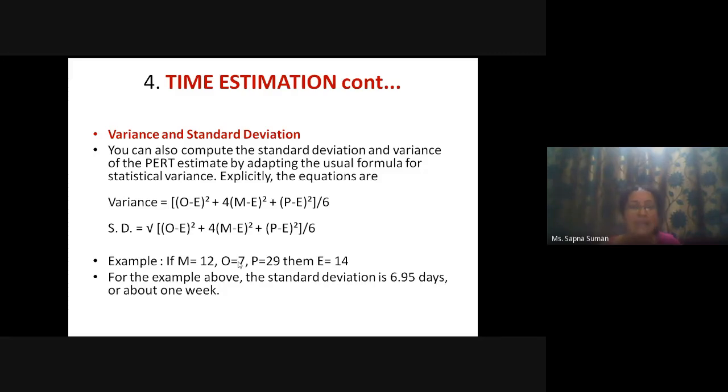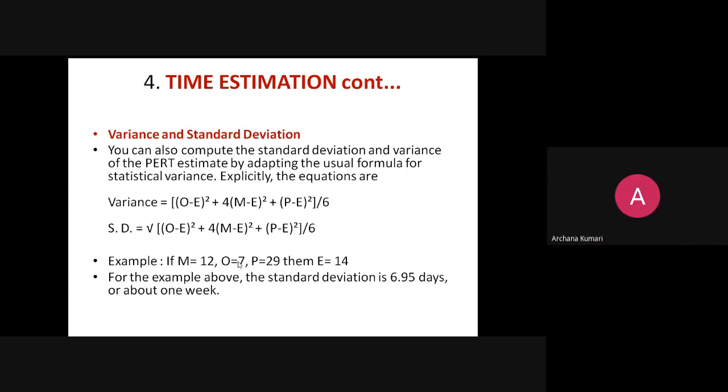That means the whole project may deviate by 1 week. The project may finish one week earlier, or it may finish one week later. This is the normal deviation, the standard deviation, which has been calculated for this particular project. I hope this much is clear to you.